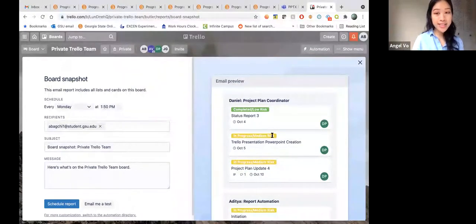They don't see any details. So it's really important that you use labels correctly, because if you don't label, they won't know what part you're on or what's been completed. Even for things you haven't started, add a red label, because those are things you haven't started yet, things you're behind on, or things that are generally high risk. That's why it's very important.